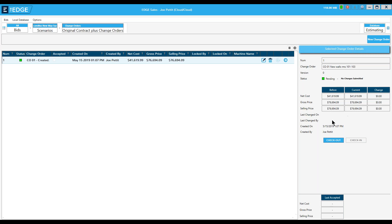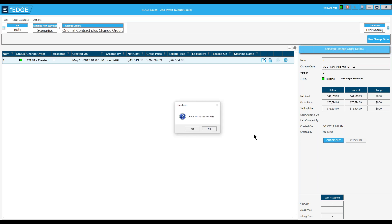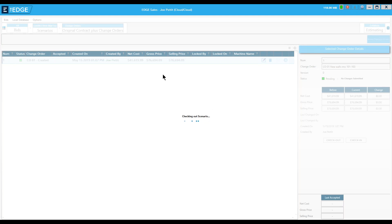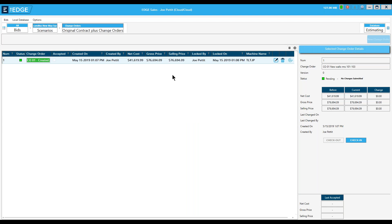Here's the check-out box — this is where I check out the change order, similar to the way you check out a scenario to make changes to it. So I check out the change order and then it moves me through the sections and pages just like it normally would in a normal job.